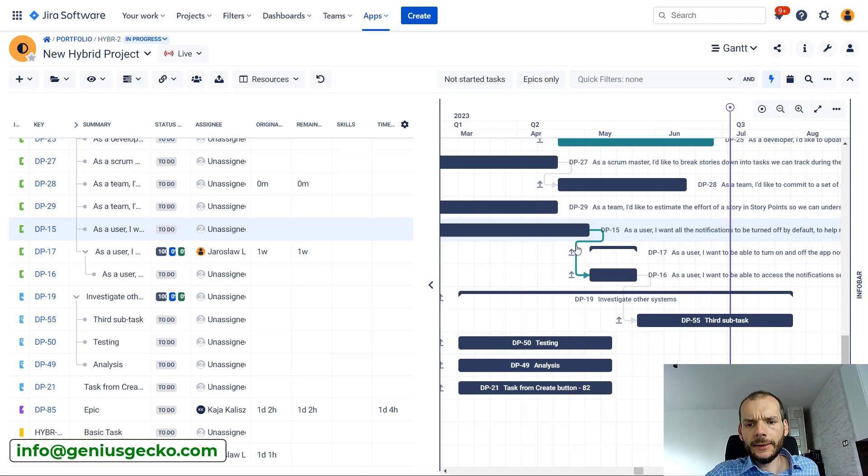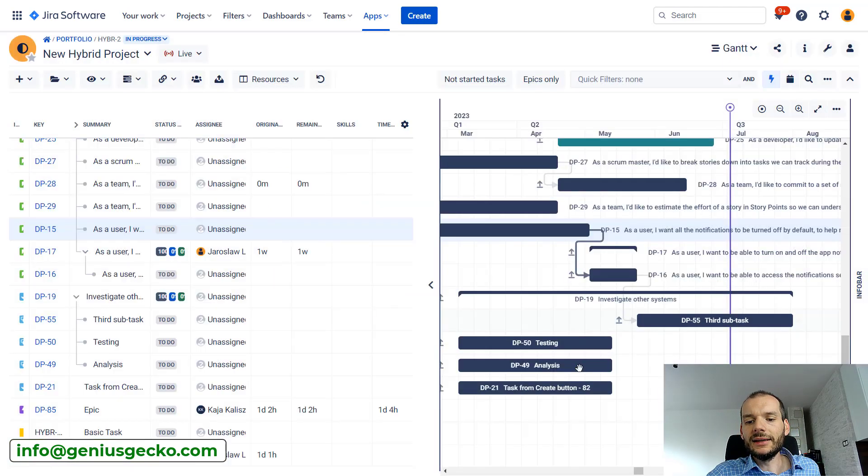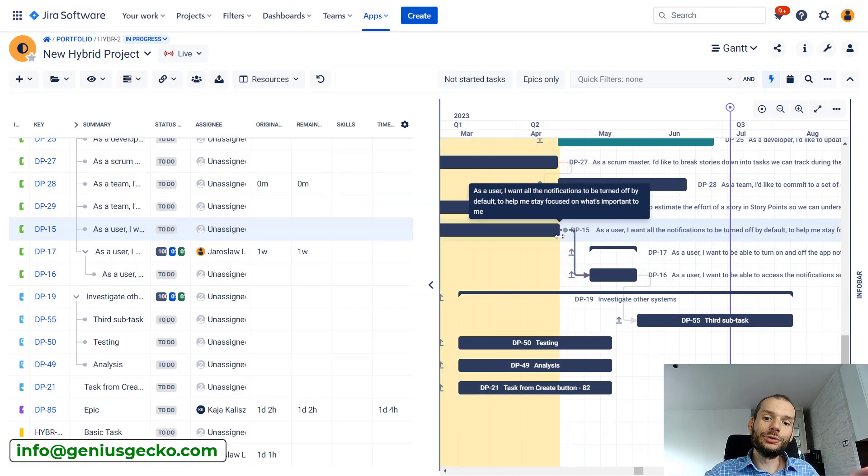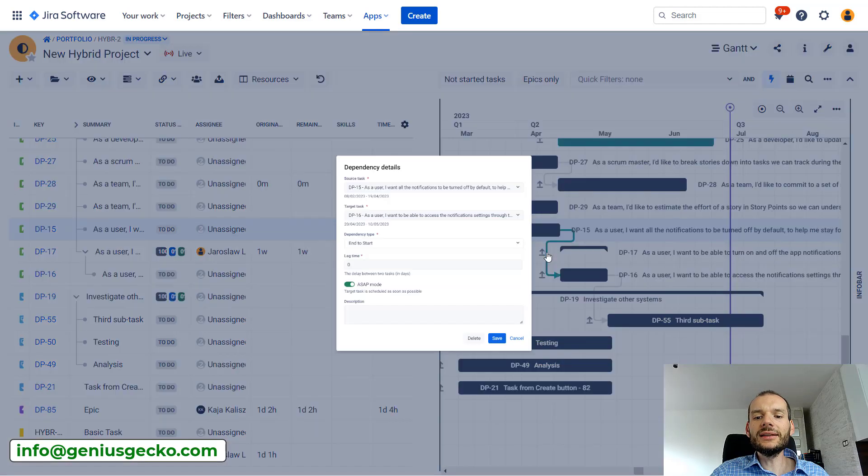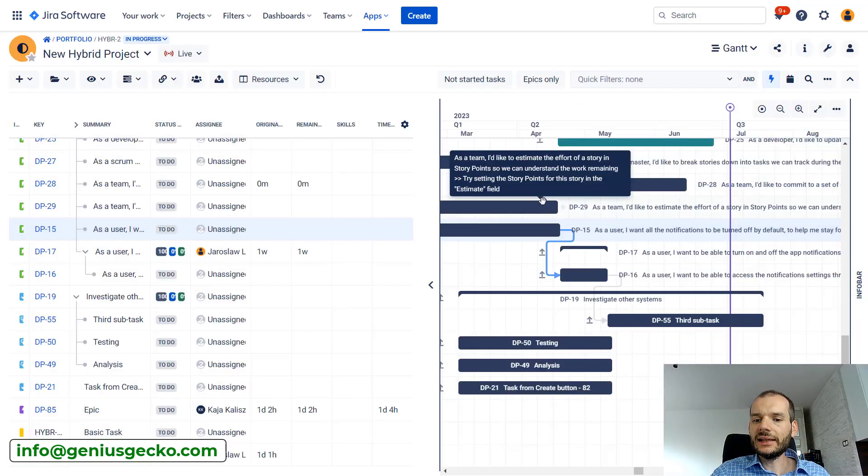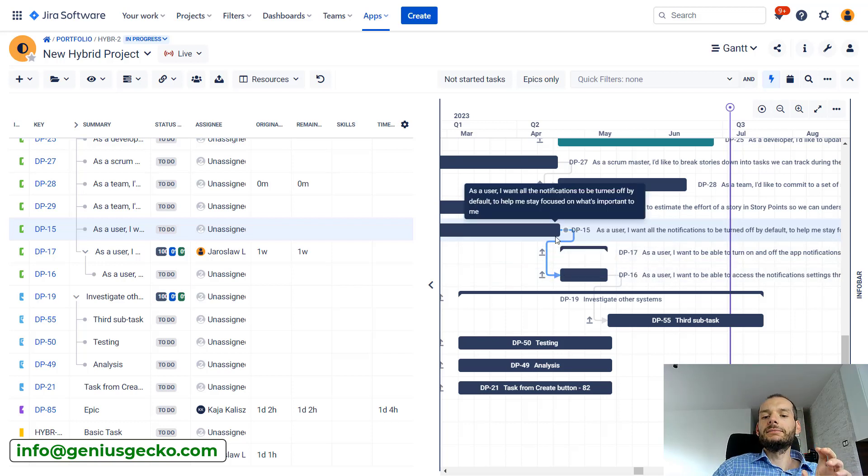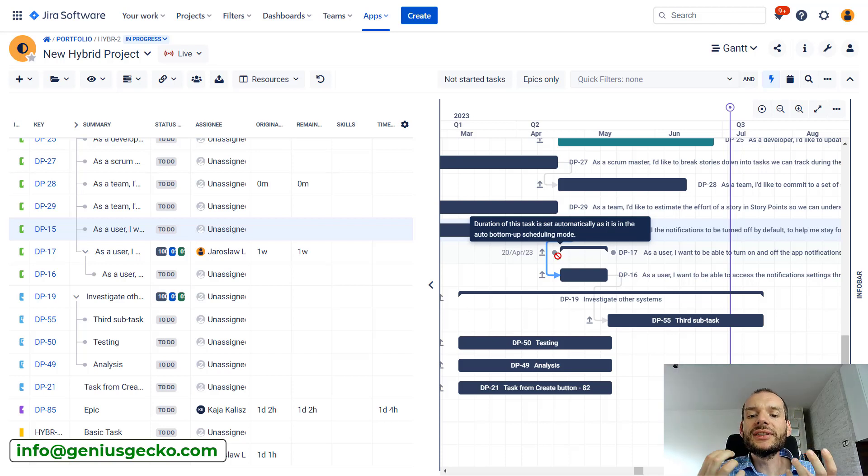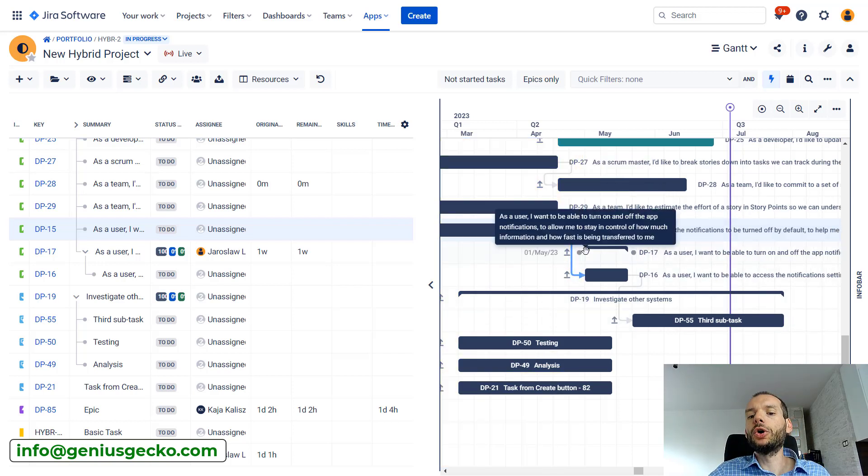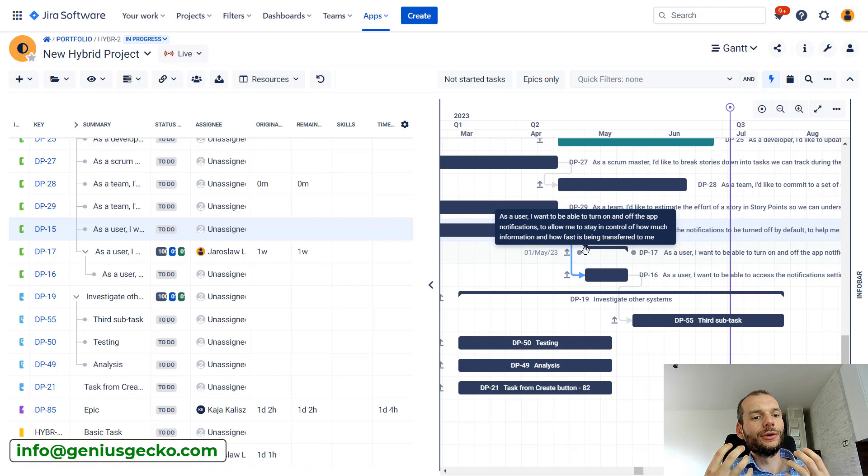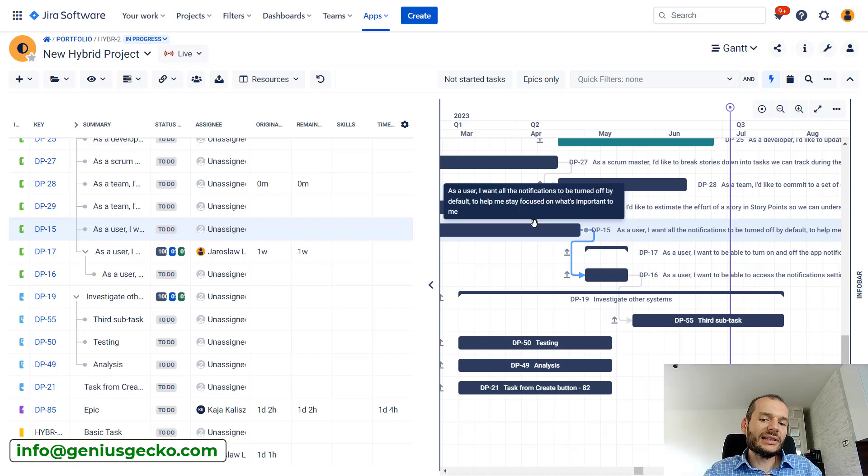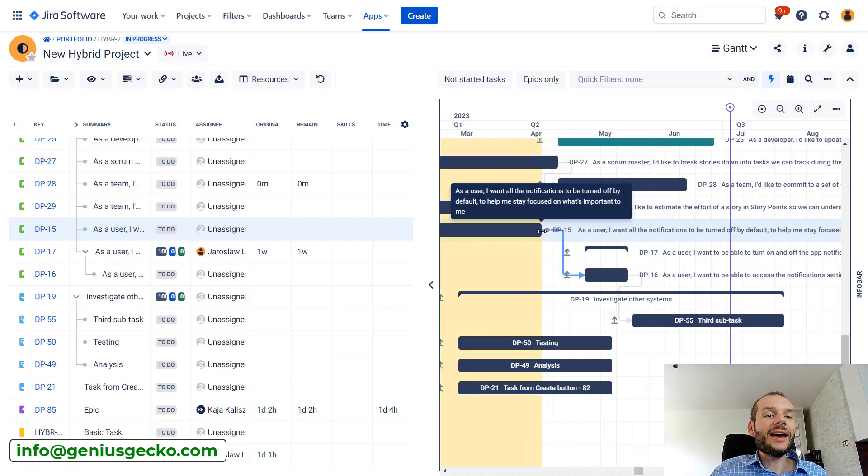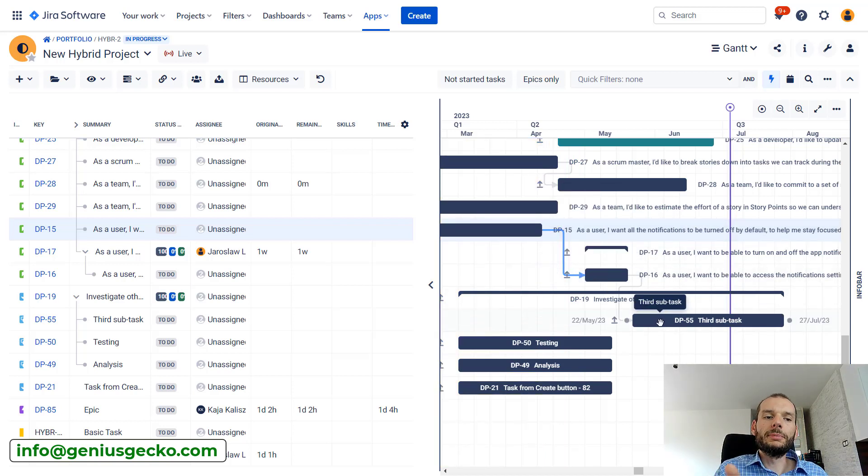There are other cases in which our dependencies won't be gray, and Big Picture uses different colors to inform us about different things. Let's click on this dependency and you can see over here we have ASAP mode. This means that if the previous task's end date is moved earlier on the timeline, all the dependent tasks will be pulled in with this one. If we disable ASAP mode, you'll see that the dependency gets blue.